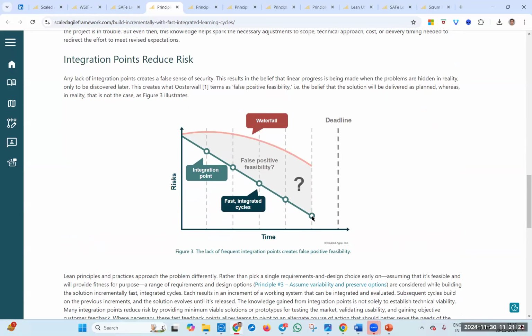Sprint 3, sprint 4, sprint 5, every sprint, as we focus on continuous integration, the code base gets integrated and validated, and we will be sure that at least until this piece of code, it is working fine. So in case of any issues or challenges, we can easily identify: let's assume 20 stories per sprint, till sprint 4, 80 stories got integrated and validated. Then in sprint 5, the next set of stories got integrated and the application is giving an issue.